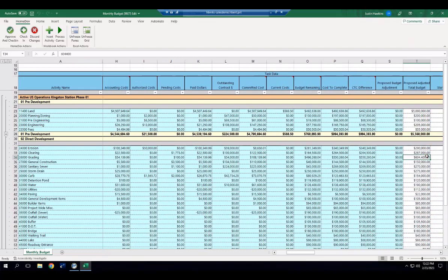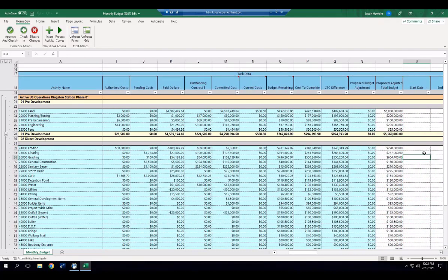And now we get into part 2 of this tool, and coming back to Rachel's question, column T is an editable budget column. So, okay, we're planning for the month of March. We know there's some extra costs coming in. So you can actually type over top of these budget numbers to say, hey, we need $50,000 in our budget on paving here. We can make changes to any of the cost codes that you know you either need to increase or decrease to shift budget money around.